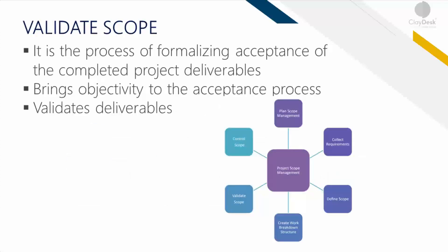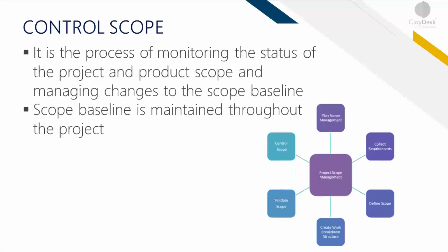You have to validate the scope, which is the process of formalizing acceptance of completed project deliverables. The key benefit is that it brings objectivity to the acceptance process. If you have a detailed WBS and a well-scoped-out plan, it's easier for all stakeholders — client side or internal senior management — to accept. Control scope is the process of monitoring the status of the project. You don't just create the scope, you also need to control and monitor it to ensure everything stays within the set boundaries. The key benefit is that the scope baseline is maintained throughout the project.